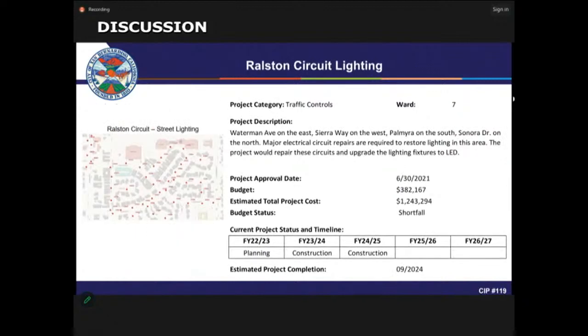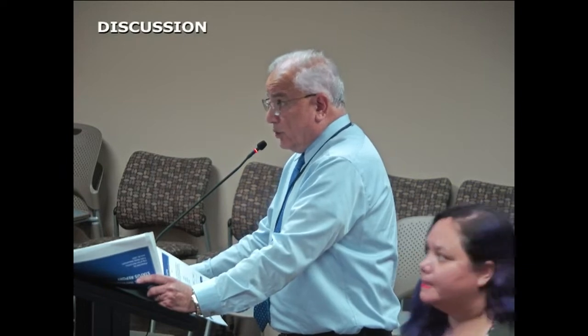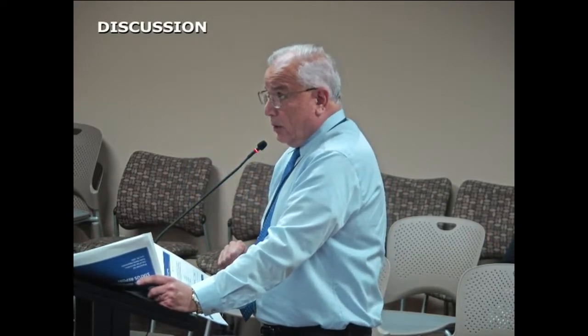The same thing with this one. This is the same type of project where the area has been dark for a long period of time. We take this as a safety project that needs to be moved forward. Even though we show a shortfall on this project, that is not the case, because once we appropriate the money and you approve the resolution in your packet, the plans for this location are also ready. Once the appropriation is completed and finance completes their paperwork, we can advertise as soon as possible.